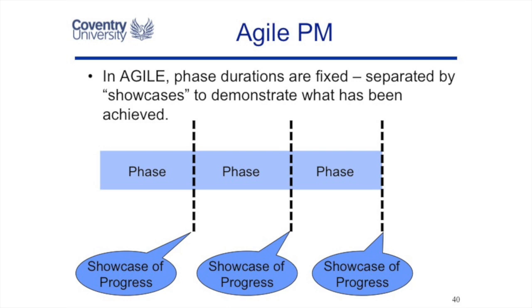Agile project management says let's have equal durations for the phases. Let's set these phases at two weeks or one month and let's have review of progress on a regular basis. By doing this we're clearly saying we want to see regular progress at key events — it's not just a sign-off by management at the milestone, it is a demonstration or a showcase of what has been achieved. Agile comes out of the software project management world, so a demonstration of working software in a showcase is a very logical thing to do.